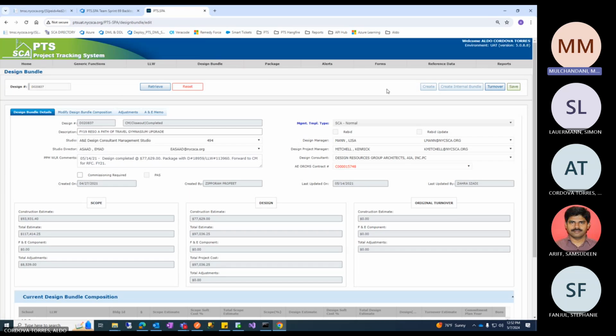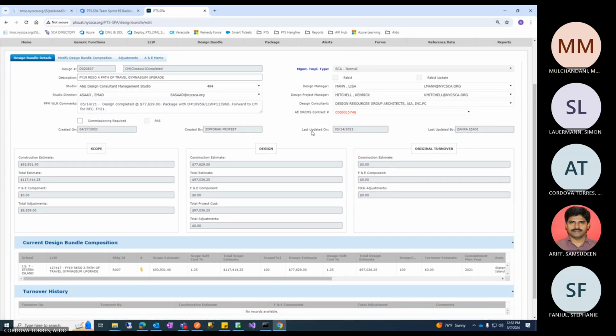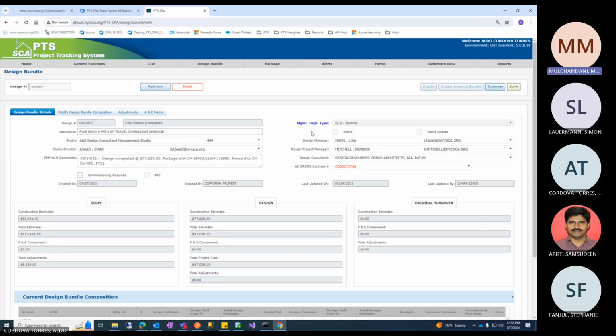The dates stay in PPM, but the resulting status changes, because every time a date is fed, the status moves. Status is a coded representation of the stage the project is in. Instead of deciphering it yourself, based on how many dates are fed and what the last date fed is, it's a quick representation of the stage where the project is. So if they put the scope start, the status changes to AE PD. PD stands for pre-design. At one point they used to call scope pre-design. Basically, they mean the same.